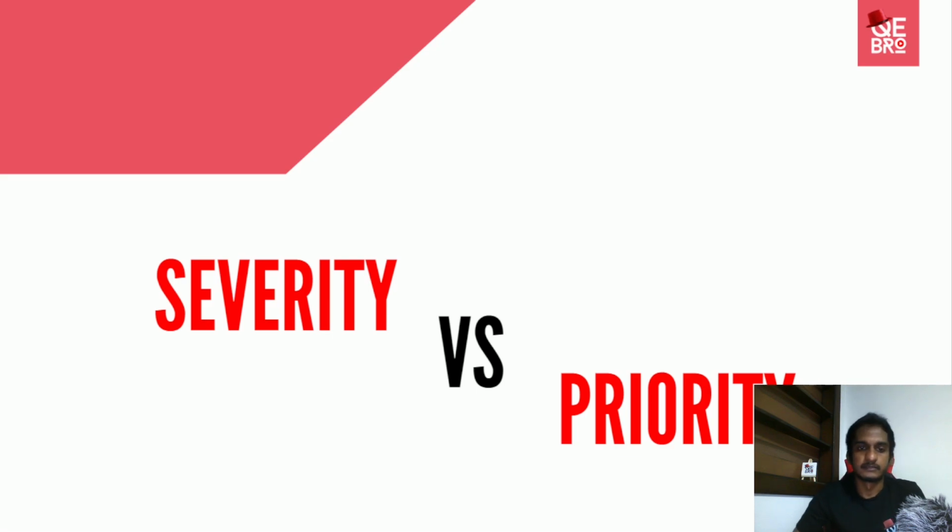As I mentioned, there can be scenarios with high severity but low priority. That means if this bug occurs, the impact is high, or it is a blocker, and the feature could be not working at all. But low priority means the possibility of it happening is very low. In that case, it is not very important to fix it sooner. For example, let's say this issue occurs for only 1% of our users, but when it happens, the user can't do anything. They have to log out and log back in. Since this is happening for a very low percentage, like 1%.